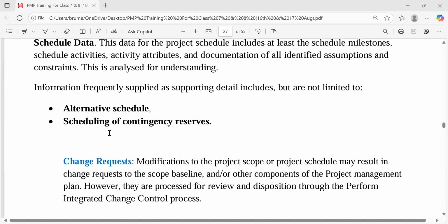So 15 days, it's the management reserve. And same thing could be done in the cost. When we have declared a budget of $2 billion, management could still have some money kept somewhere, like an additional $200 million hidden somewhere we are not even aware of, because they would want to protect and preserve their project and they have additional money because they can't declare all they have.